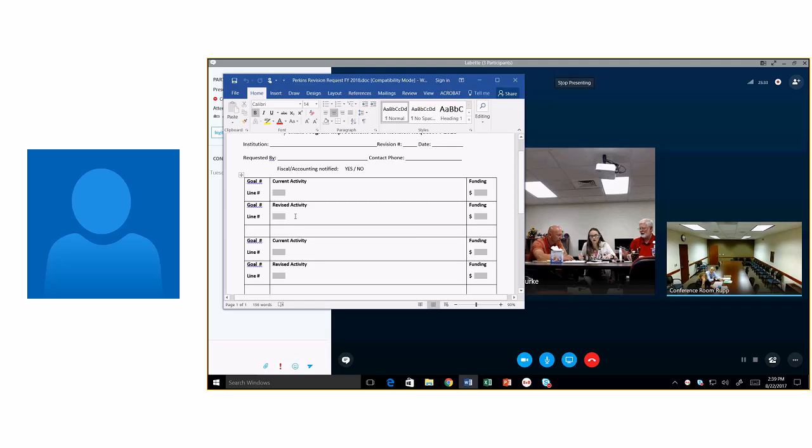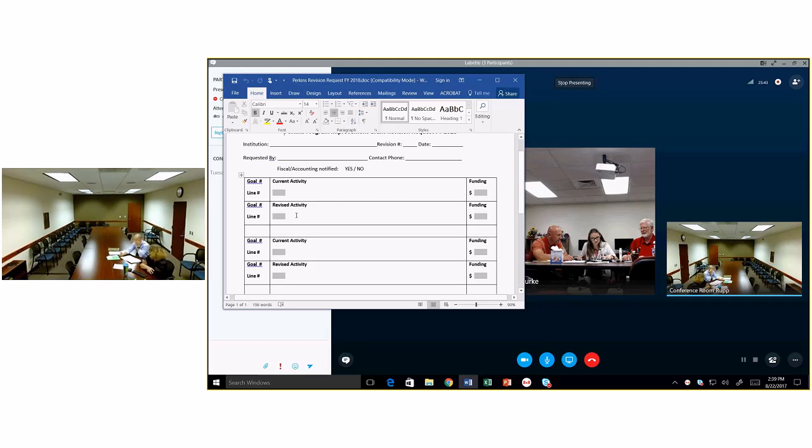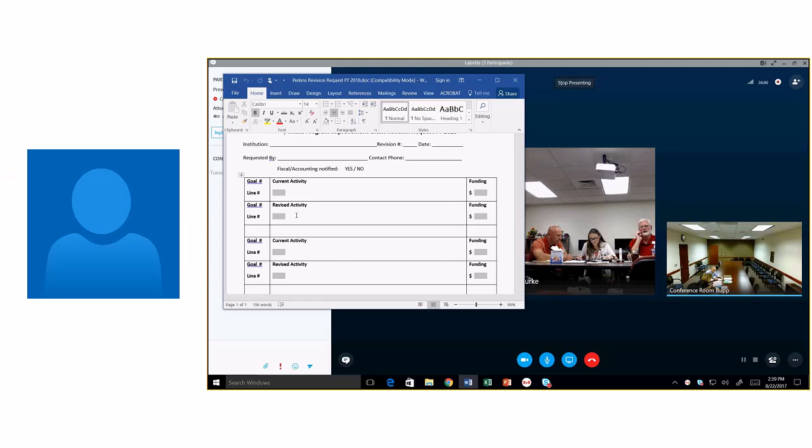Okay, so it's the first item. Yeah, if it was $145, I would put that on that first line. A lot of times people don't bother to list the equipment line by line, and we have it in a pool by the goal number. But we're looking at your budgeted breakdown of expenses right now, and it's by line number. So instead of costing $145, it's going to cost about $400. Yeah, it's closer to $400.